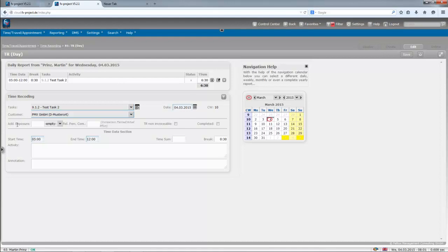You also can say I need some additional effort, for example, I need 5 more hours for this. You also can say, okay, I've worked for this whole thing, and I would say we are nearly 80% ready with this task. It depends on the settings for every task.